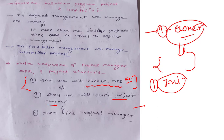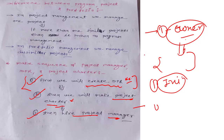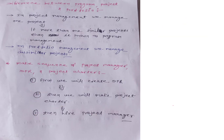Just as living in India means following the Indian Constitution, a project requires rules and regulations given by the Project Charter. The sequence is: first create the DPR, second create the Project Charter, and third hire the Project Manager. UPSC may ask when the Project Manager is hired — the answer is after preparation of the Detail Project Report and Project Charter. Then the project manager or project management team is hired.